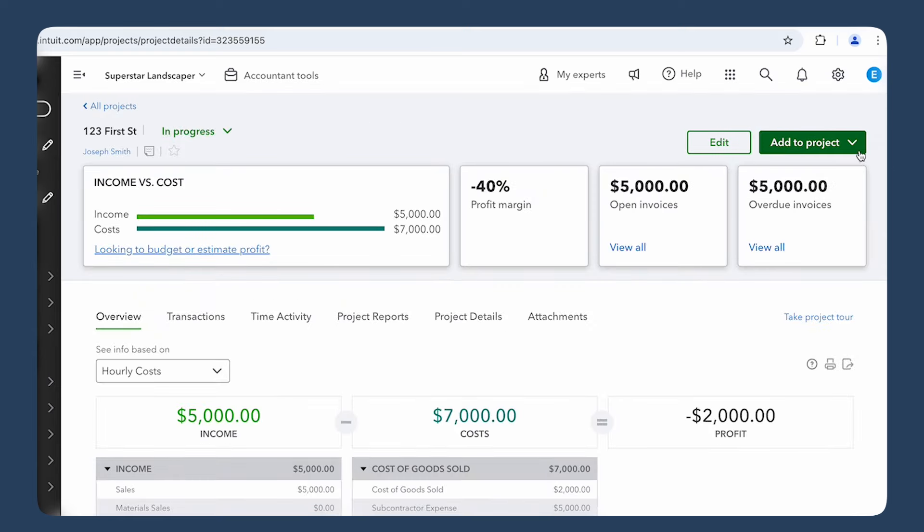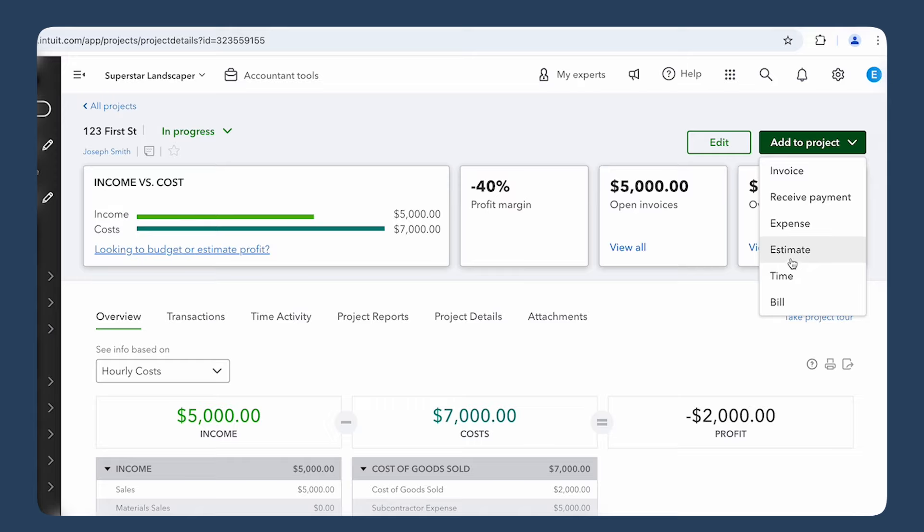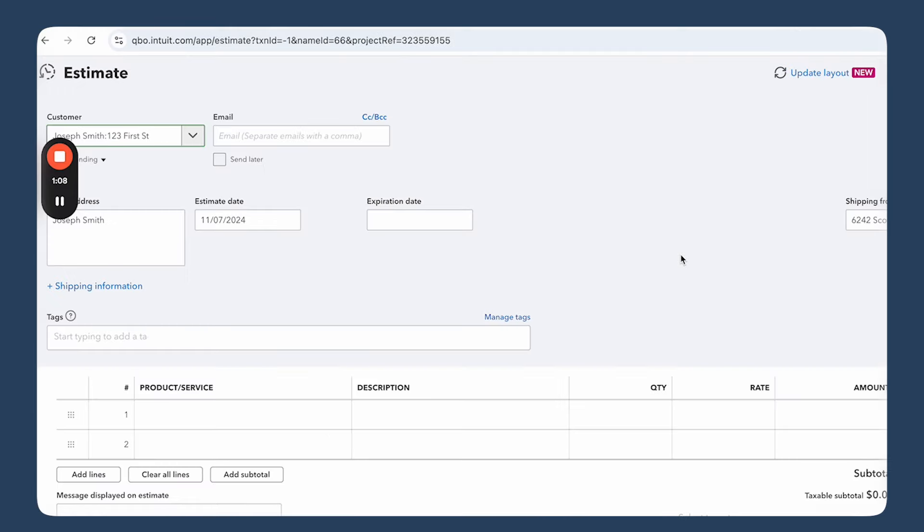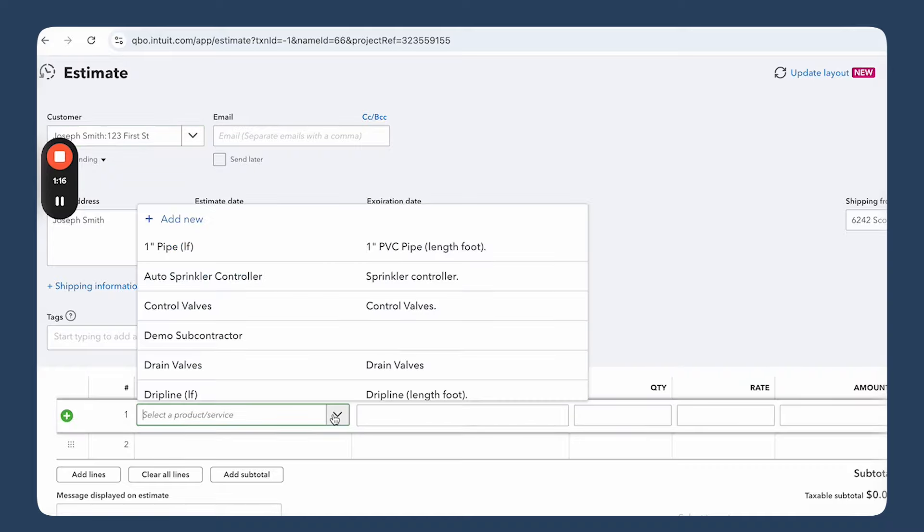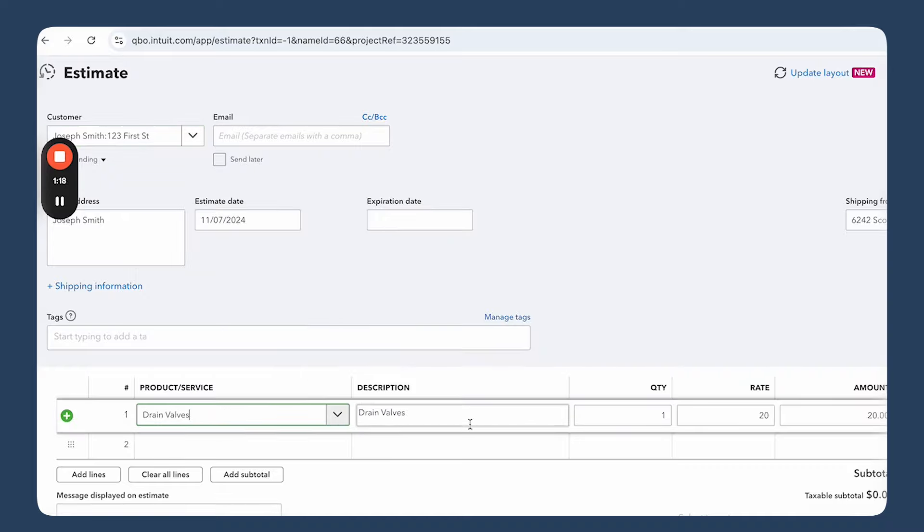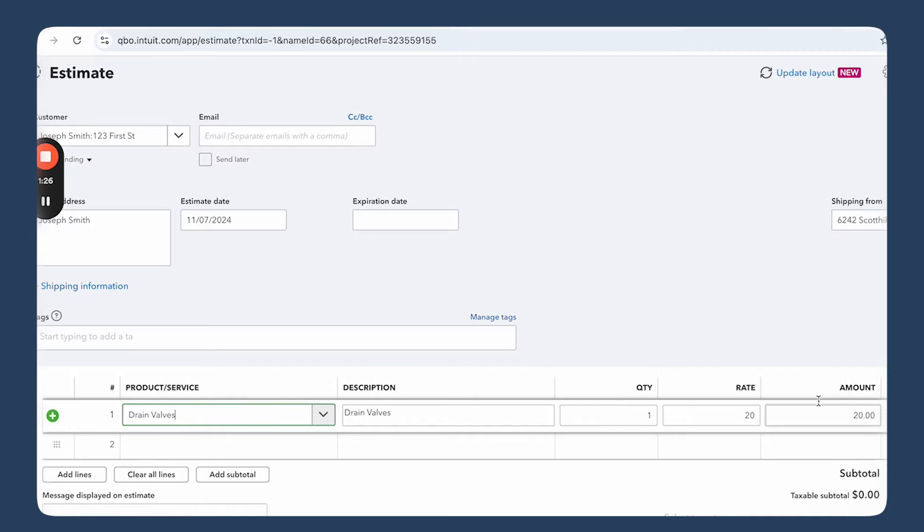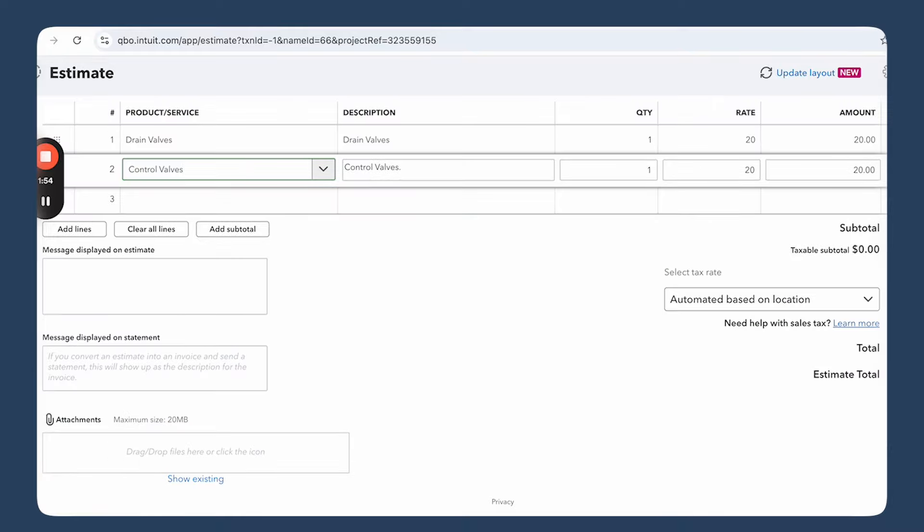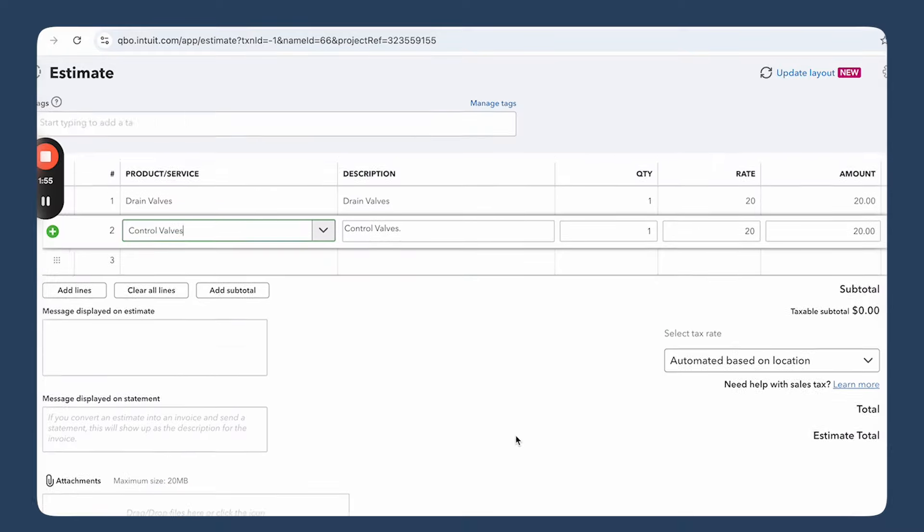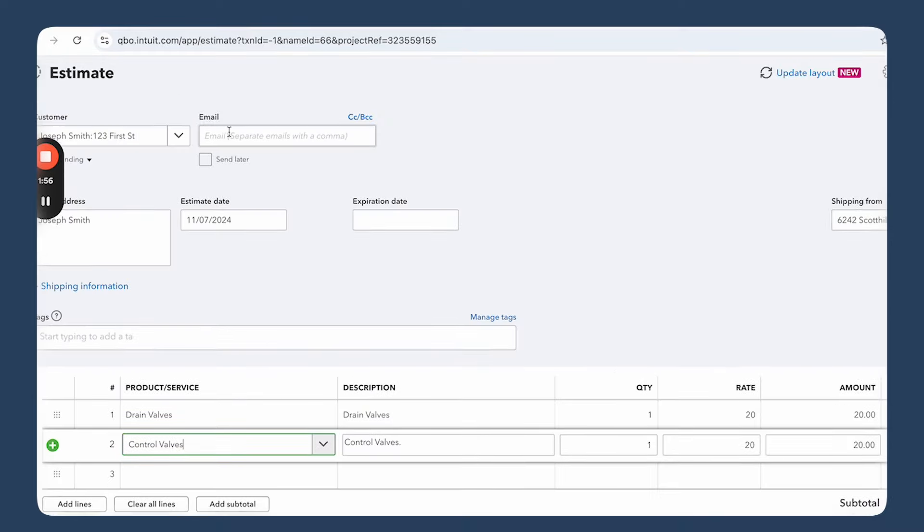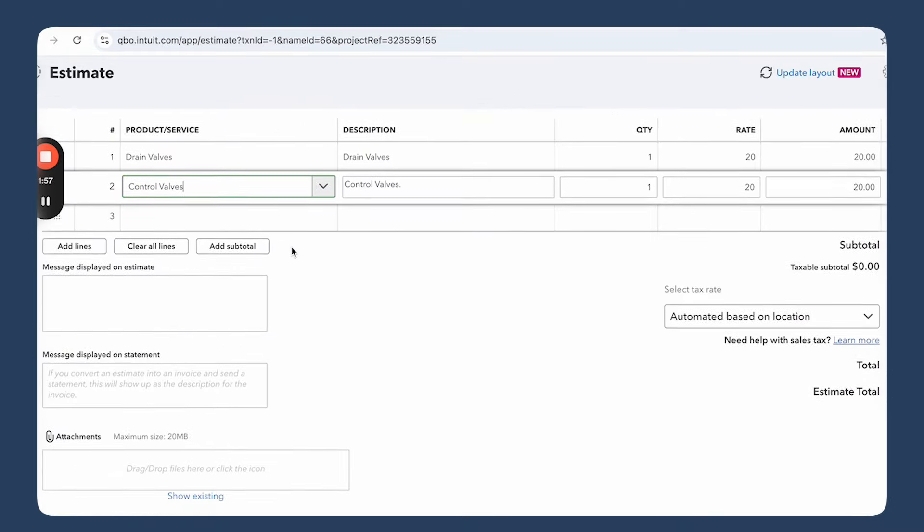After that, you go into the project and you can add to the project the estimate. If you click right here, it will create an estimate for you. Enter all the job details—site location, project description, you name it. And then list out all the items that you're going to be using. You can put in quantities and rates and amounts, so you're giving a clear picture and accurate picture of the job costs. After that, you are just going to save and close. Just make sure you have the email in here and you have all the messages and attachments that you would like to have.